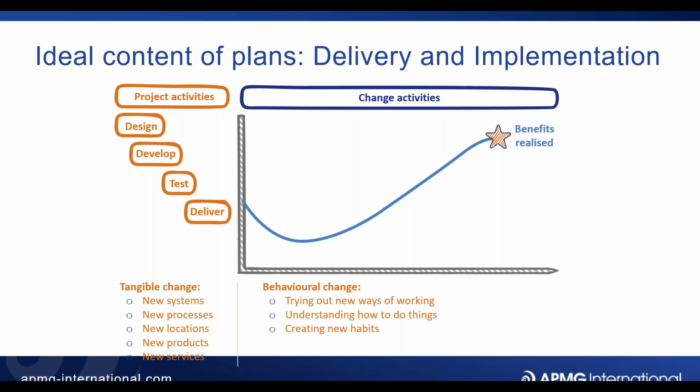So in terms of our planning, we need to be aware of that, because that starts to give you a feeling of maybe what I need to do is collaborate. Therefore, any planning activity we do isn't just with those people that are going to build, in this example, the portal, but they are also there with the people from the accommodation unit who will identify all of the changes that they need to make and all of the work that they need to do at the same time.